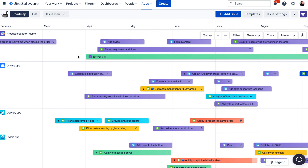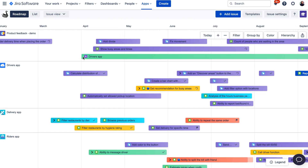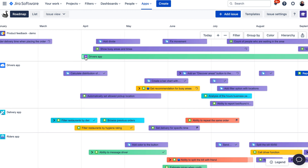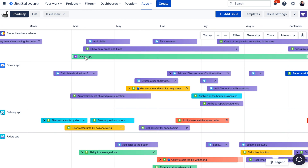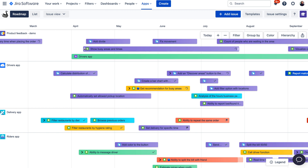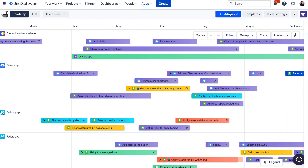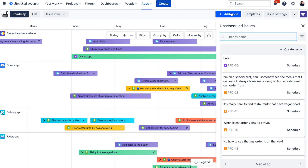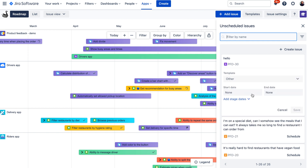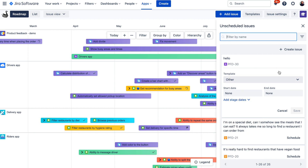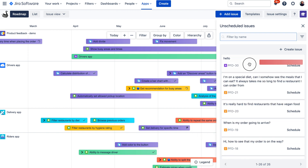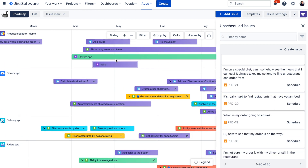After you import projects in the issue view, if you are already using start date and due date fields in Jira for your issues — for example, if you are already using the Jira project-level roadmap — you would already be able to see issues on the Swanly roadmap. If you are not using these fields, you can schedule the issues from the plus Add Issue panel, either by clicking on the Schedule button and selecting the start or end date, or you can simply drag and drop the issue on the roadmap.